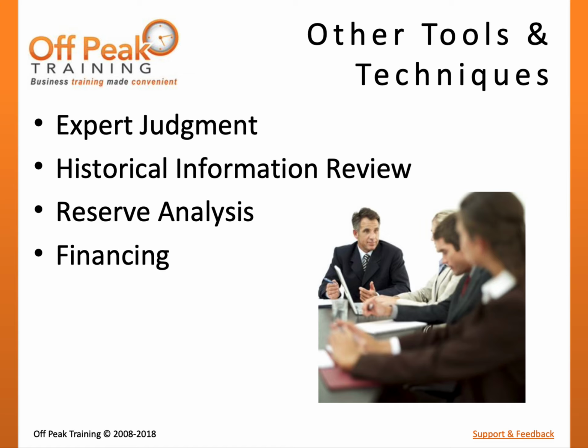Reserve analysis is a technique used to counteract risk by adding a buffer into the cost estimate. In this process, management reserves can be added to the project or phase level based on unidentified risks. Since these can be difficult to estimate, some projects may utilize a percentage, such as plus 10%, to anticipate these unidentified risks.